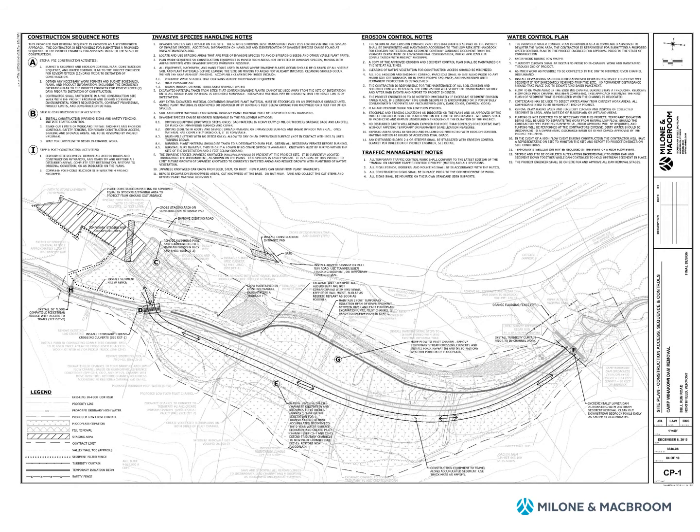The construction plan shows a general sequence that you can follow. Before construction begins, the selected contractor will submit their sediment and erosion control plan, water control plan, and the sequence, or use the one provided here. The staging area is archaeologically sensitive and will need to be covered with construction matting so that the ground will not be disturbed. The access road will need some upgrades, including 2 new cross culverts, as well as some new gravel application. Gravel can be used from the excavation area of the project.